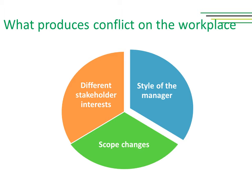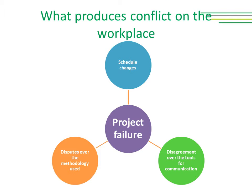The second step we are going to discuss is what produces conflicts at the workplace. They can be defined in seven different reasons, which vary from different stakeholder interests, style of the manager, scope changes, schedule changes, project failure, disputes over the methodology used, or disagreement over the tools of communication.